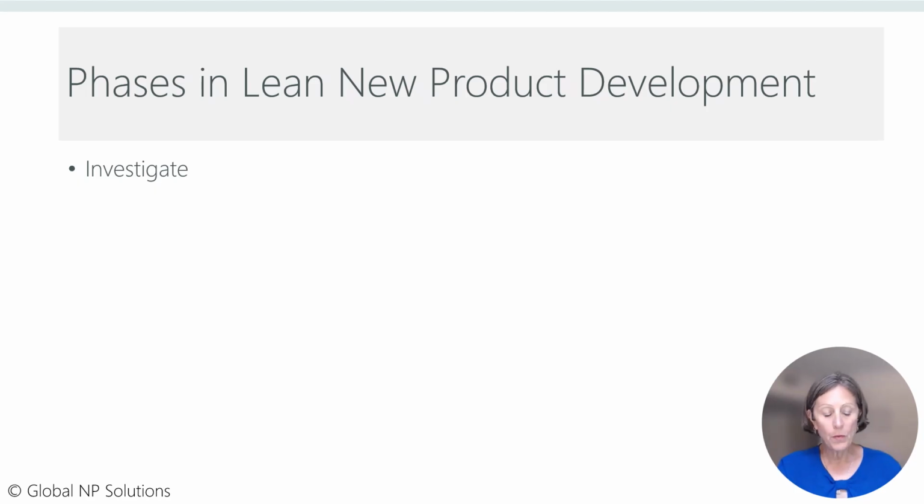Lean New Product Development workshops are described later in this section and in later episodes. Investigating customer needs and product ideas starts before the first Lean workshop, with some activities falling into the prototype and engineering workshop. Outcomes of the investigate phase include product and engineering specifications. The product concept should be thoroughly vetted before the team moves to building prototypes and engineering models.